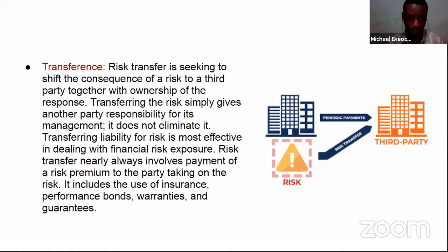I'm not saying anybody will get into an accident, but it doesn't eliminate that possibility completely. You are just transferring responsibility to a third party to take care of that event should it happen. That is what transference is all about. So risk transfer is seeking to shift the consequence of a risk to a third party together with ownership of the response.